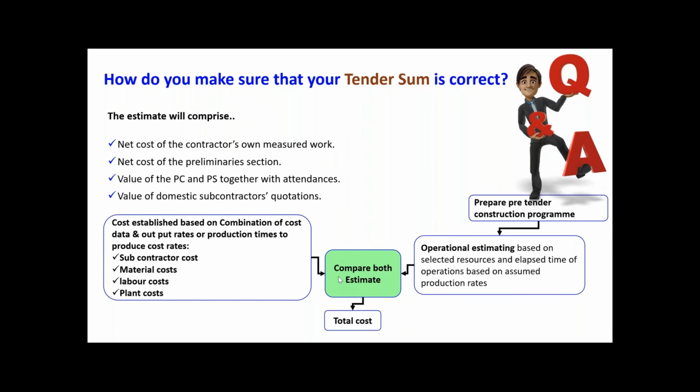They can check it easily. Now this is substructure, this is superstructure, elemental wise. They can have the comparison. They can troubleshoot where is the mismatching, where is the more deviation happening. Then they have to verify each other again. Then they have to finalize the price, if they are mismatching with the price level.